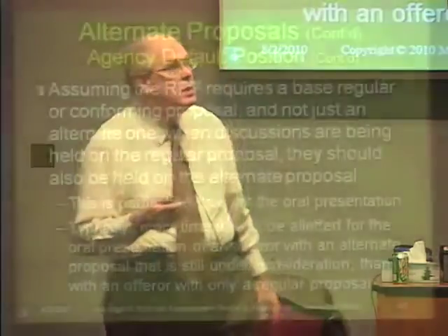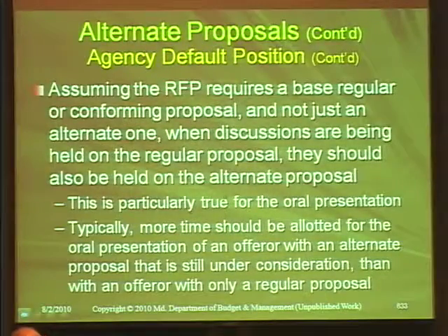in the same meeting with the vendor, you can discuss both. You'll discuss one, then you'll discuss the other. And maybe you'll even have more time with that vendor because you're discussing two different proposals. But both of them will be in the running as if they were two separate proposals from two different vendors. Particularly true for the oral presentation. Typically, more time should be allowed for the oral presentation of an offer with an alternate proposal that is still under consideration than with an offer with only a regular proposal.